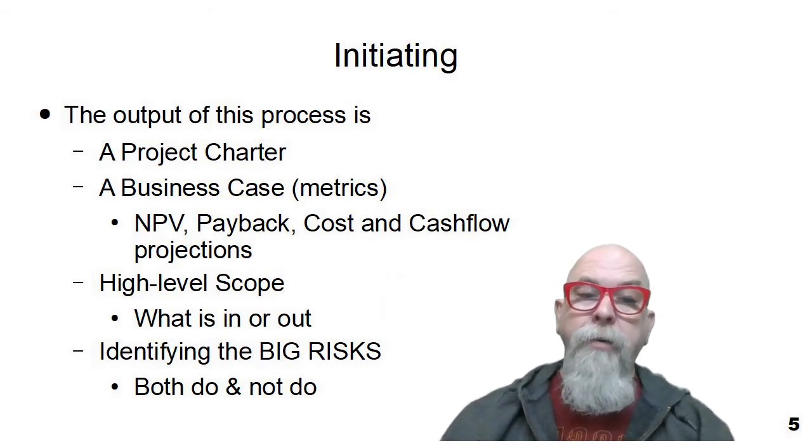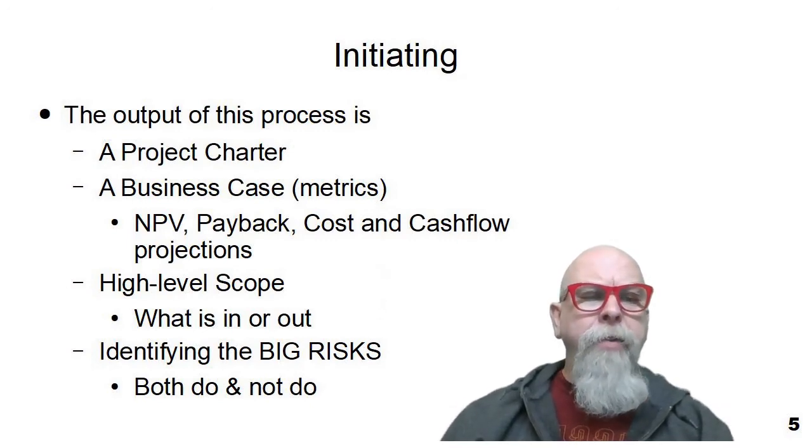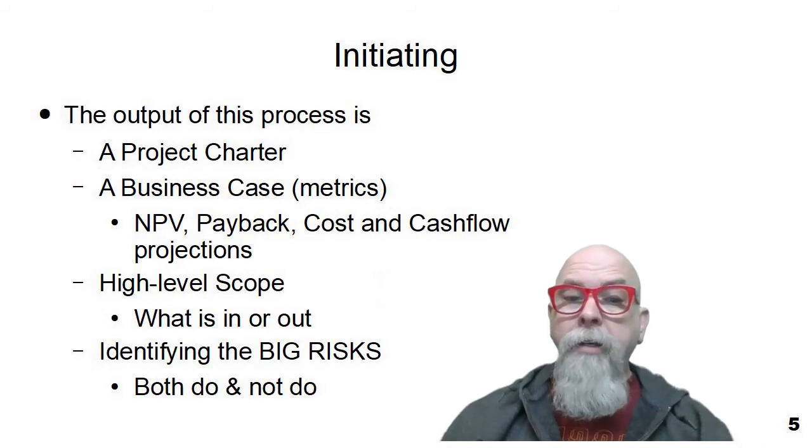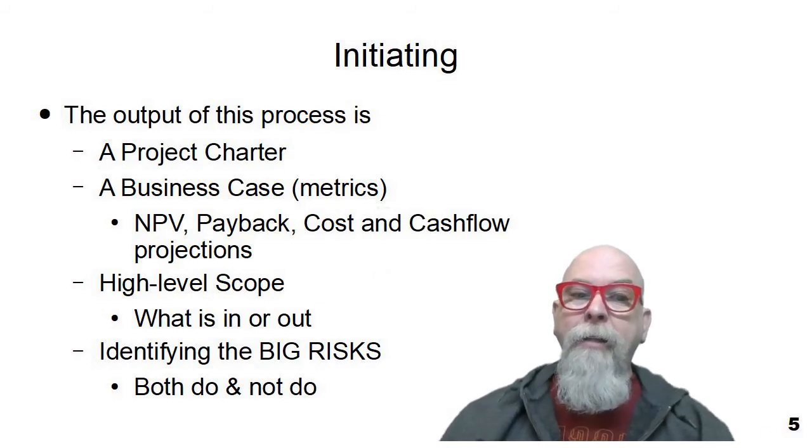Net present value, payback periods, cost estimates, cash flow projections, and other things are going to be done during this initiating phase. Because if we understand what it's going to cost, and we have a good business case, then the likelihood of the project being a success is much better.